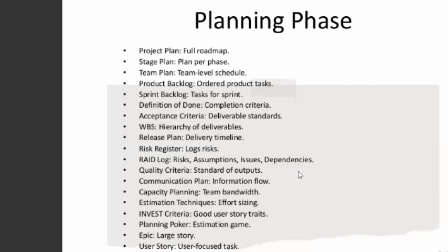You could document in Excel, you could document in MS Word, you could use any tool you might want to, provided that it's organized. You have the risk title, the risk number, the risk code, the potential impact of the risk, the risk assessment score, the mitigation plan, and the likelihood of the risk. A lot of parameters that you could identify in your risk log are available.